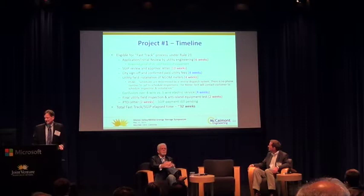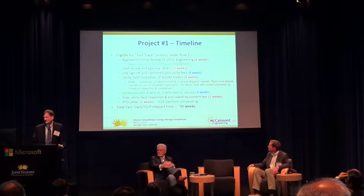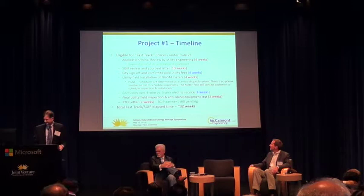So the total time was about 32 weeks, roughly half a year, to go through the process. I'm providing that merely as information. I'm not intending to be critical about the process in any way, just information about the time that it typically takes to go through the process steps of the self-gen, the inspections, and the PTO.